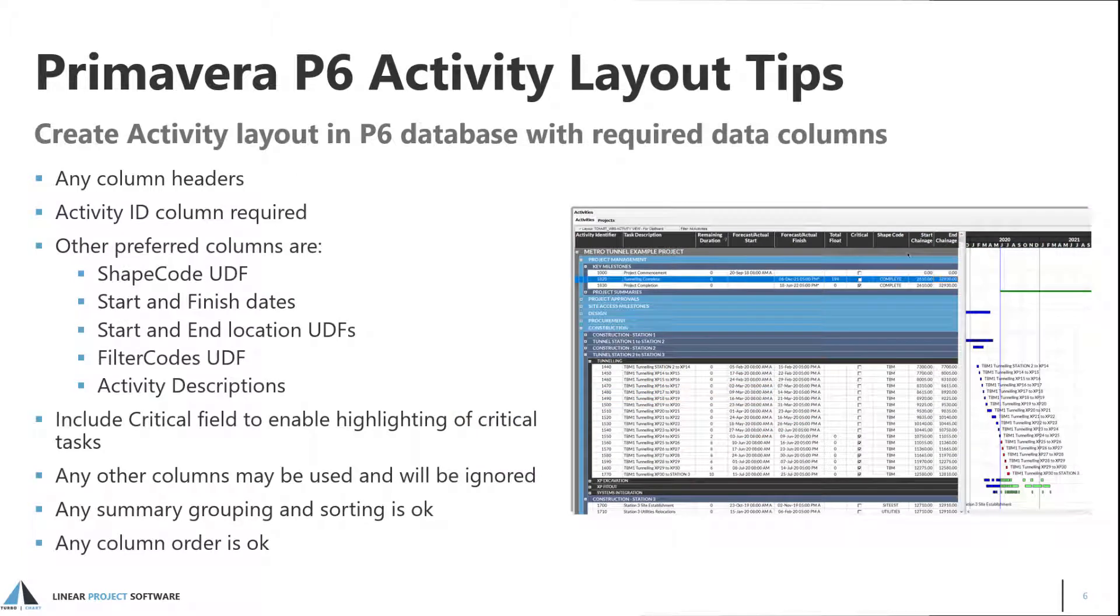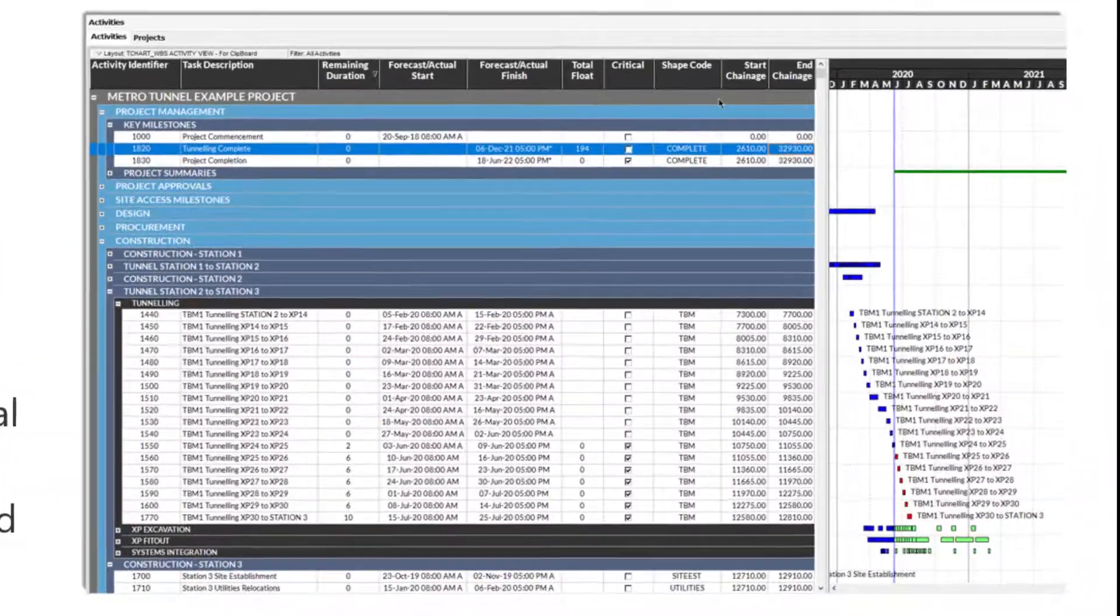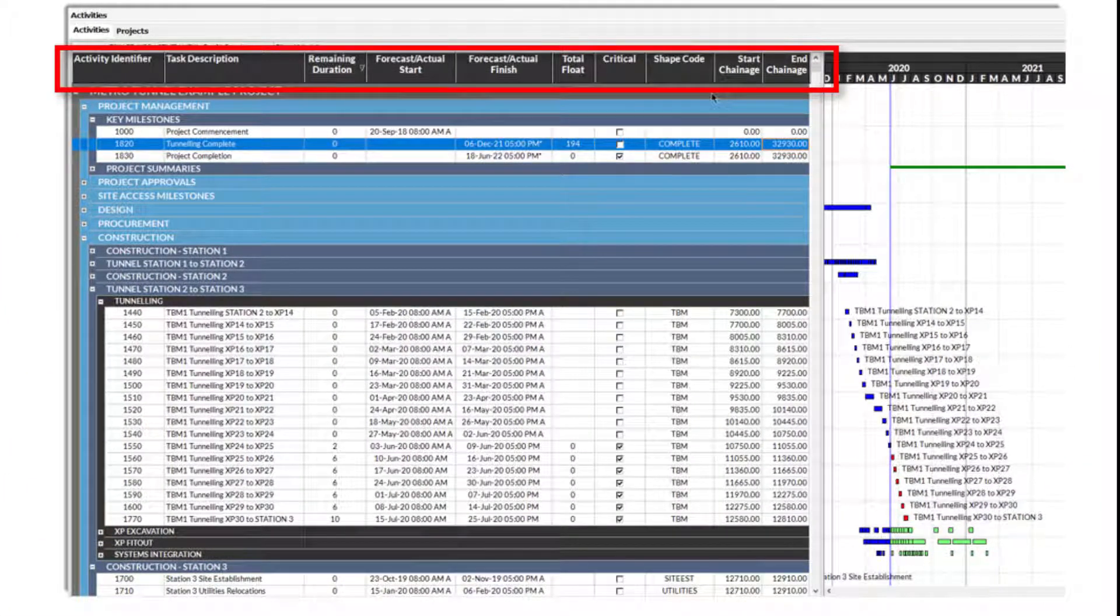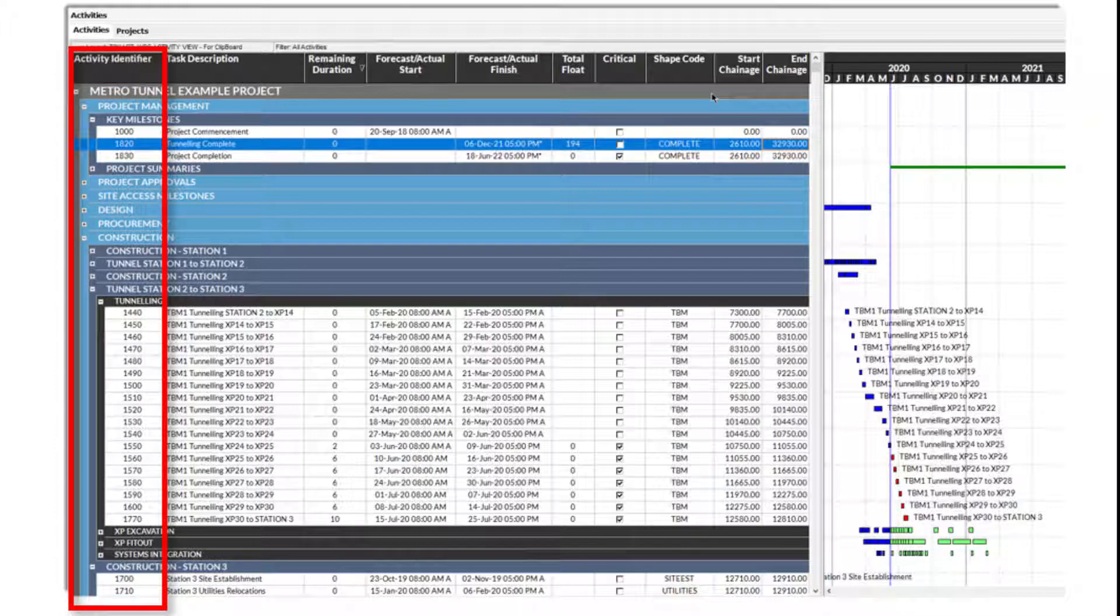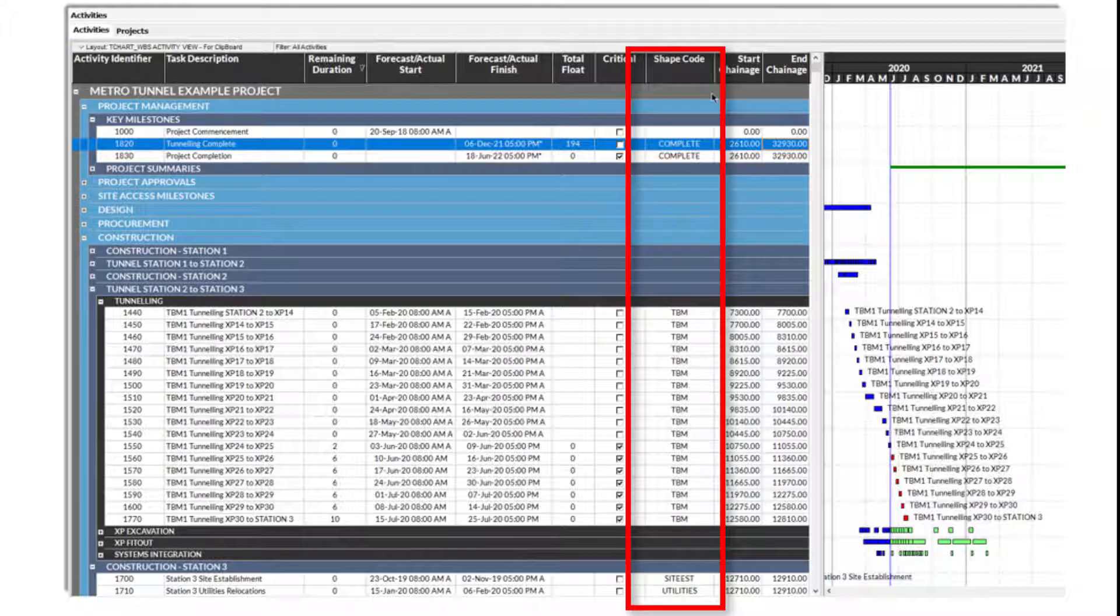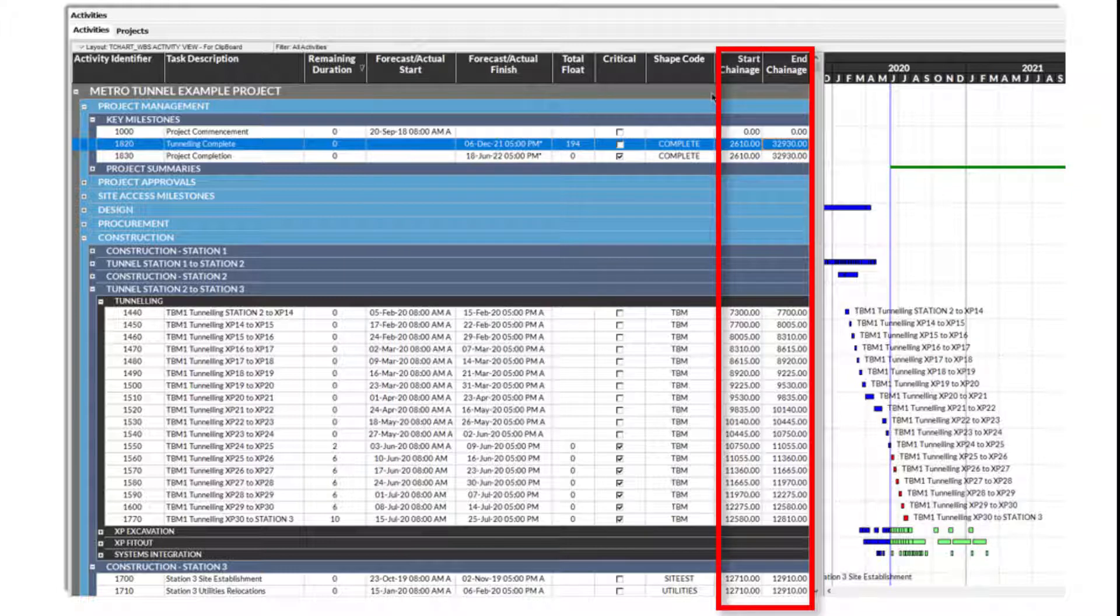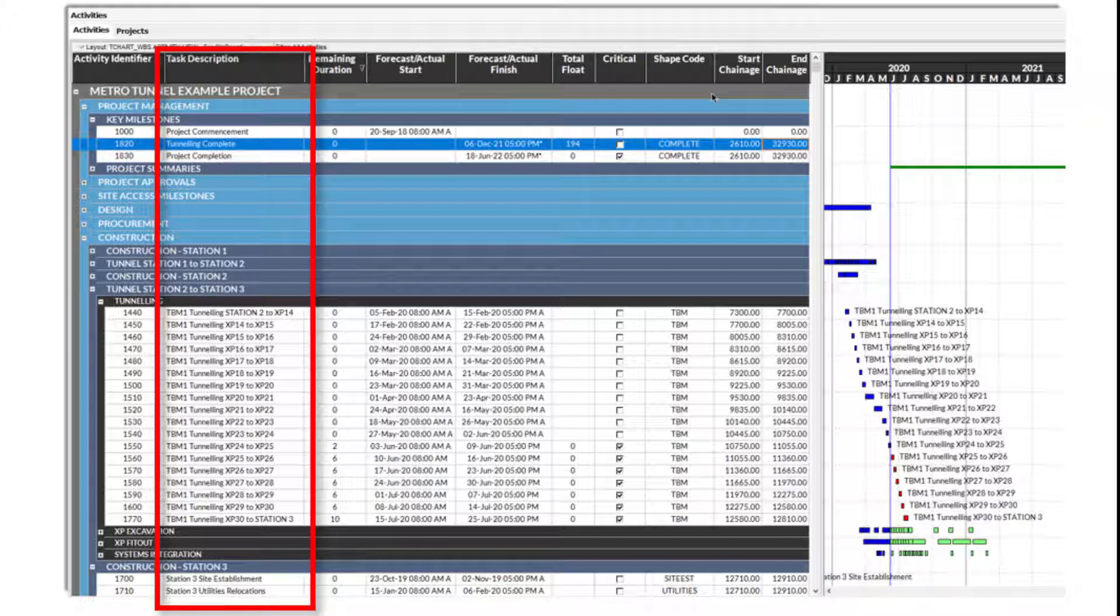To copy activity data from P6, create an activity layout that contains the data to be imported into TurboChart. This layout can be a working layout used as part of normal schedule development and maintenance. The column headers can have any name and can be mapped using the Paste Wizard. The activity ID must be one of the columns as TurboChart matches using activity IDs. Other recommended columns are the shapecode user-defined field, the start and finish dates for activities, the start and end location values, an additional filter code if being used, and activity descriptions or any other text field that can be used to display as descriptions.